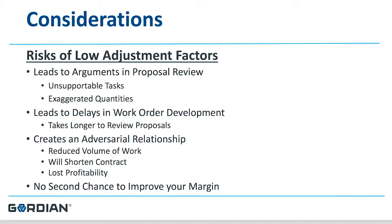The risk of a low adjustment factor is that you might not do a lot of work, or you realize you've bid too low and try to put inappropriate line items in a proposal — then have to defend them with the owner. That can damage the contractor-owner relationship. It can lead to unsupportable tasks within a proposal, padded or exaggerated quantities, long delays in developing a work order, and an adversarial relationship with your owner, which can result in reduced volume of work, a shortened contract length, and lost profits.